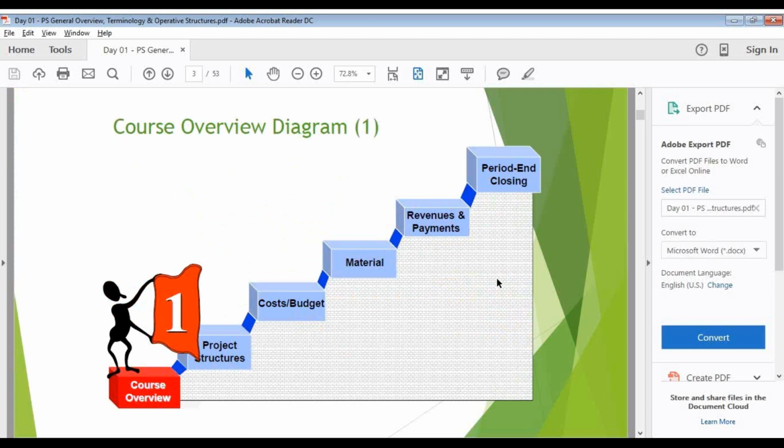The basic process is what you are explaining. The basic reason why we do RA and settlement is we have to do RA to know the progress of the projects, to exactly know where we are financially. So what is the revenue we're getting, and what is the work in progress, whether it is surplus, or whether there is still WIP. To know the health status of the project, we will run the result analysis.